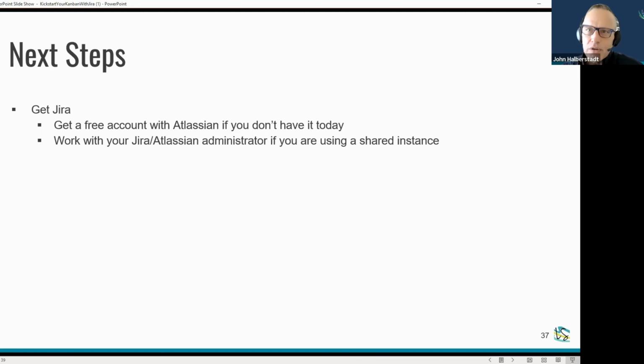If you do have Jira in your organization, and if you're part of an organization that is unhappy when you start installing or using software that you're not supposed to or messing with theirs, you may want to run that by your admins. But in some cases, like Cate said, without doing any harm to any other projects, if you have access to a project, in most constructs of Jira, you can create your own board. It's just a different construct, doesn't mess with anything the team has today. It's an additional item that you can use and share with others. So you can use different boards against the same data set without causing any problems, and that's a great way to experiment.